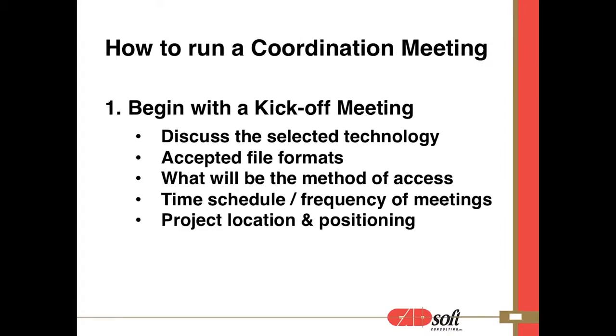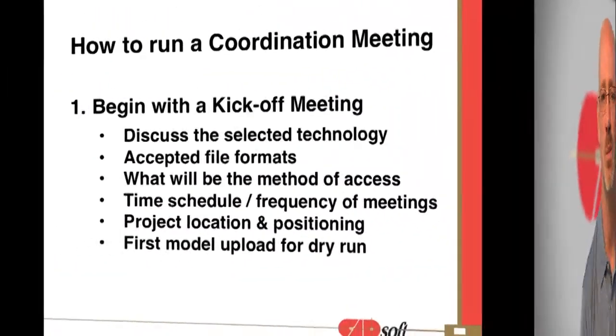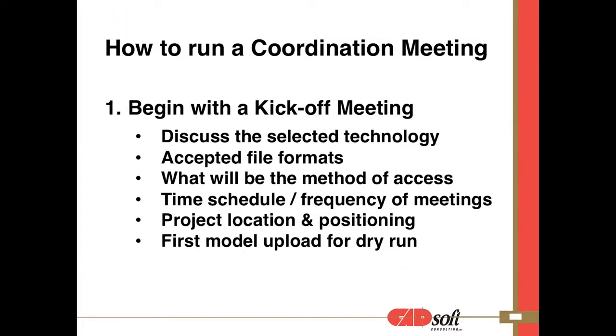One of the most important things and the biggest hurdle to get over is project location and positioning. Probably one of the most important things to talk about during the kickoff meeting. Where are we going to upload our models, and where is our origin point going to be? It's a good idea to actually have a dry run, whether we do that in the kickoff meeting, or it's best, I think, to follow so that everyone is